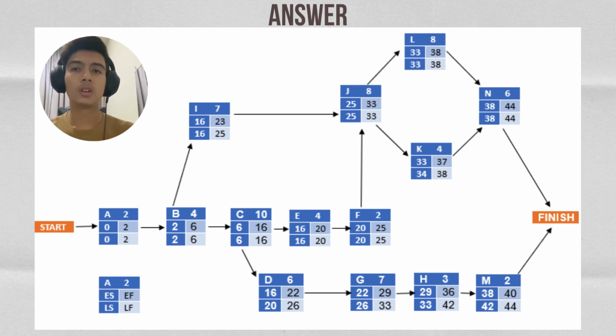So the early finish for column A will be put in the early start of column B. So we will repeat the same process that we did in column A for column C, E and F, also repeating the same method. Before we go further, we look back into column C. The column has 2 junctions, I and D. So we focus on column I first. Column I will use the same method as we did for the past columns.